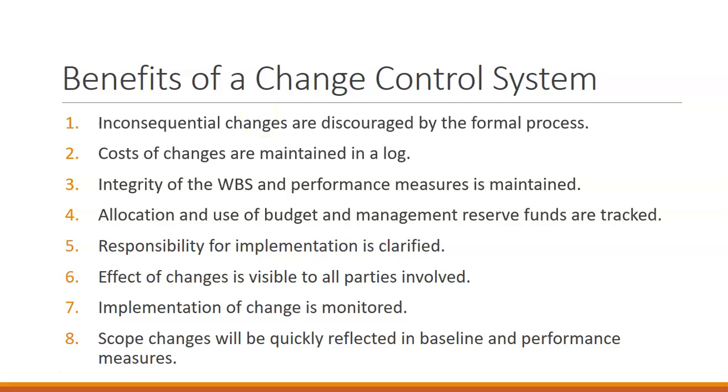Okay. We also have tracking. We have a communication log of what changes happen, when they happen, why they happen, who approved them, and what cost is going to occur with them. The more records we have of our project management, the better we are when we get into the performance measurement of how effective the project was, how efficient we were, and how well we were about keeping on schedule.